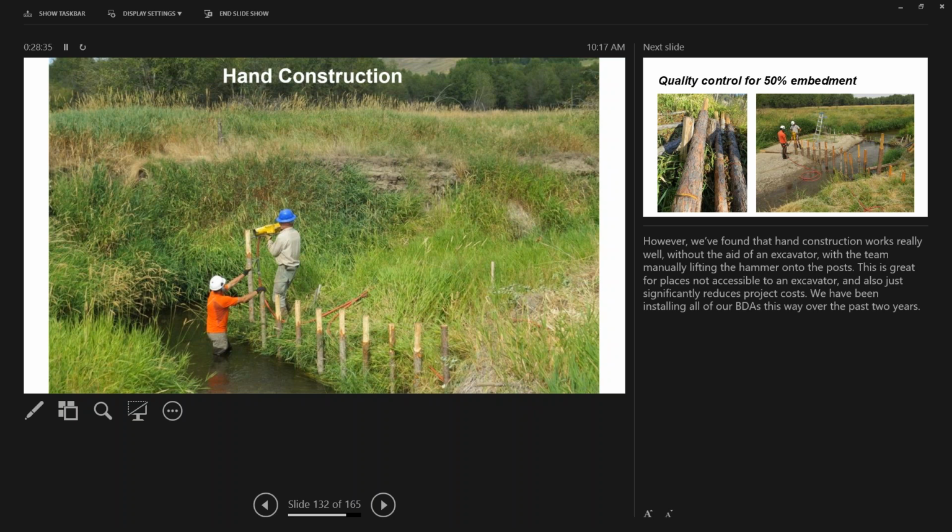Now, we have great access, so we can drive an ATV or a tractor or a truck pulling a big air compressor to power the pneumatic hammer. We have the luxury of using the pneumatic hammer because we have really good air compressor access. But we're going to be experimenting with smaller air compressors to see just how small you can get and still have enough power, because there are some places where access is a real issue and you may need to use a hydraulic hammer. But it's just different considerations.